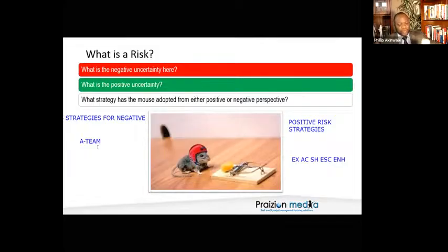So where does fallback plan come under? If the risk happens, then we will do this. So let me give you another clue. You're not using plan B until the risk happens, right? Contingency. It's also known as a contingency plan.